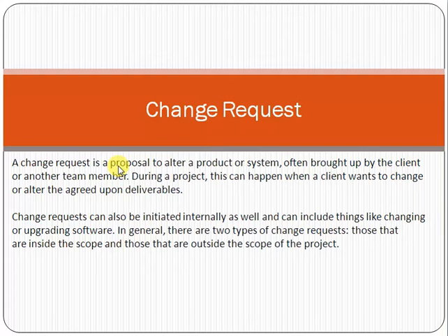And one more important thing is that it is not necessary that cost will always be associated with the change request. Change request means the effort which we need to handle the change. Cost can be associated or cannot be associated. So first of all, we have to identify the change. What is the change from the signed scope of work? What is the deviation from the scope of work?